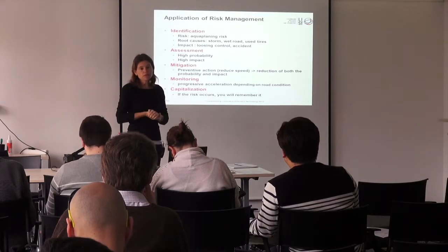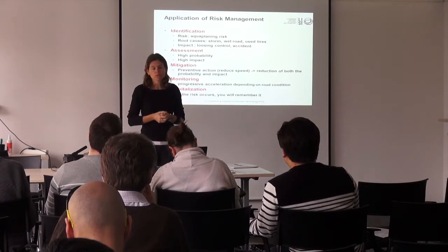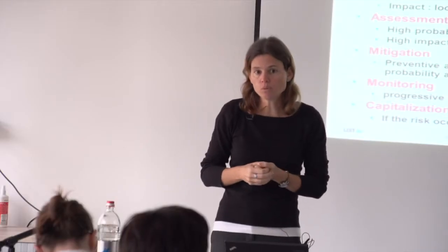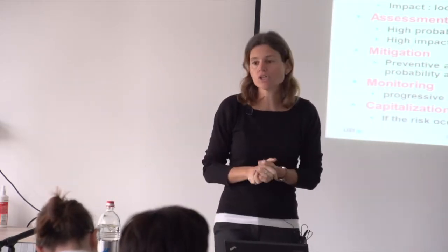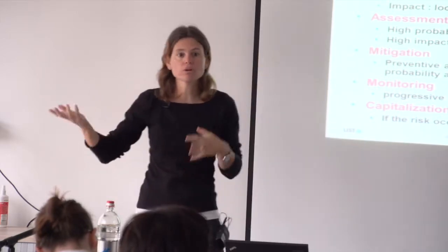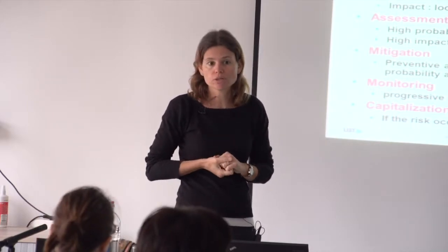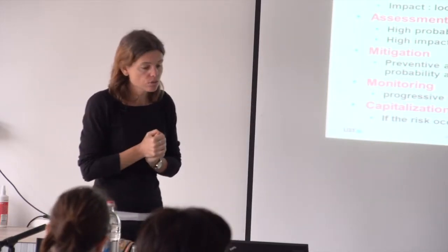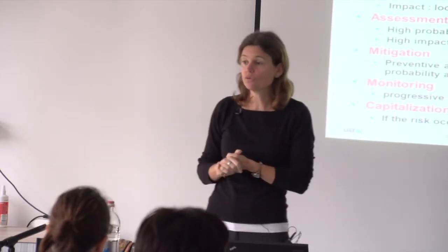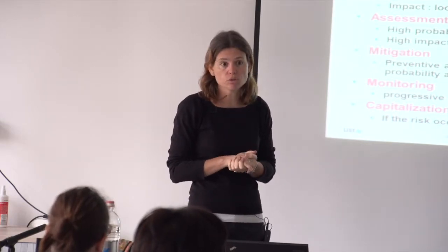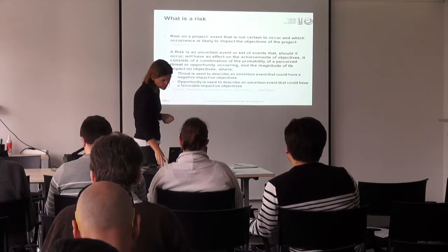And then in that case, there was no capitalization step in your risk management activities, but there would be one. So if you had an accident, if you had injured yourself or crashed your car, you're pretty sure that next time you're in the same condition, you will reduce your speed and you will make sure that you don't slip on the road. So capitalization is about if the risk occurs and if you learn something about that situation and you try to do better next time. Okay?